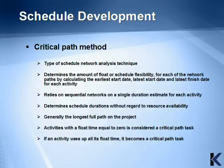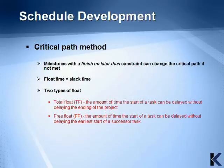If an activity uses up all of its float time, it becomes a critical path task. Milestones with a finish-no-later-than constraint can change the critical path if they are not met. Float time is the same as slack time, and there are two types of float. The first is total float, which is the amount of time the start of a task can be delayed without delaying the end of the project. And free float, which is the amount of time the start of a task can be delayed without delaying the earliest start of a successor task.